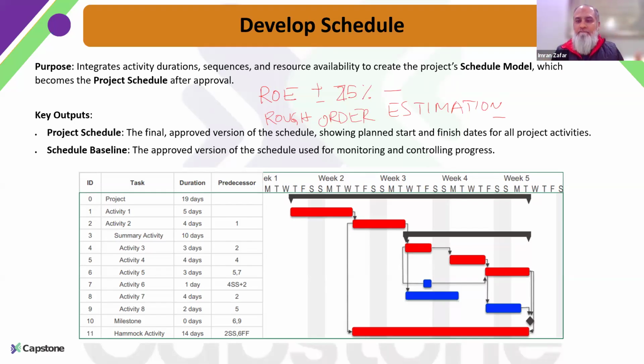you always keep some margin during that time. Okay, if I need to complete this project, let's say it will take 6 months, and once it is approved, then you can start working on it. Okay, this is the scope and how I can complete it within the time. But yes, rough estimation, plus or minus 25% generally, not 75.